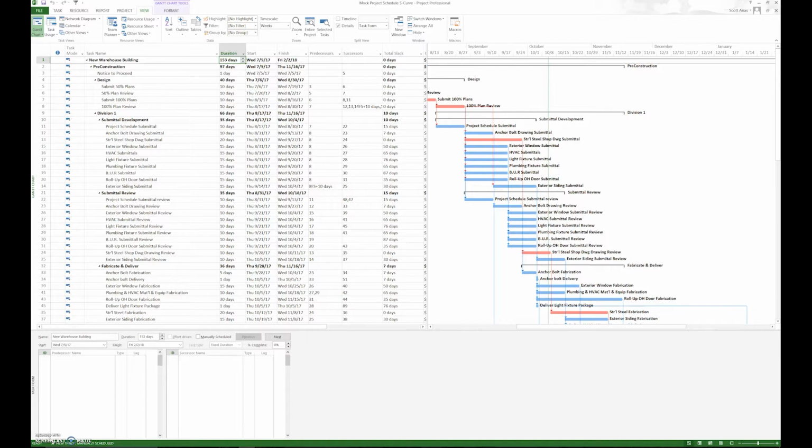Now, you're going to have redundancies that actually occur within the schedule. It's just natural. As you assign predecessors and successors, we're going to come across those natural redundancies. However, using my advice of only creating 1 or 2 predecessors for every activity and 1 or 2 successors will help reduce the amount of redundancies you actually have.